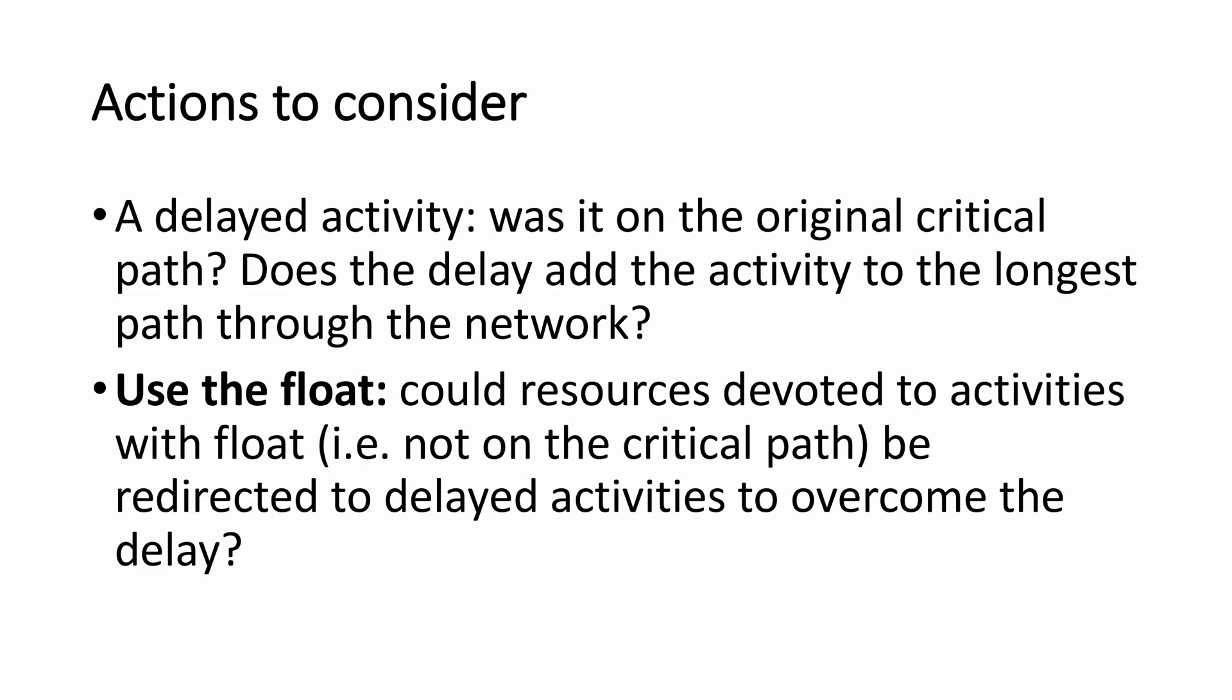Could the business respond to these delays? Well yes, of course it could. But it could be that there are activities that have what's known as float, that they can be completed without delaying the critical path, without extending the critical path. And it may well be that some resources that are devoted to those activities could be redirected to the activities which have been delayed in order to help them achieve their target quicker, to be completed quicker. And that's the beauty of float. What you try to do is to allocate float or spare resources to activities that are on the critical path to try to make them shorter and therefore potentially reduce the project completion time.